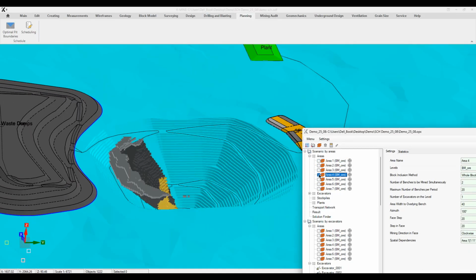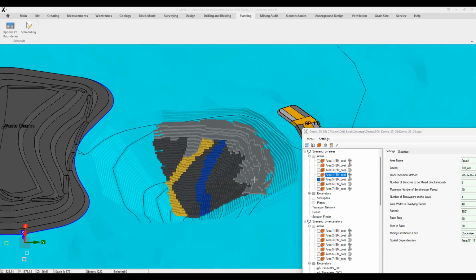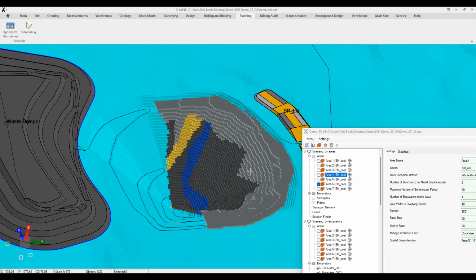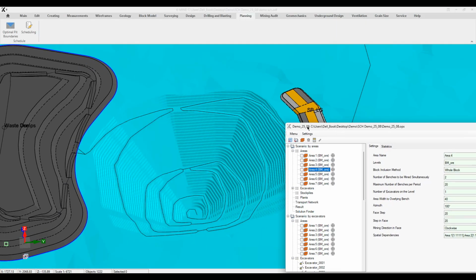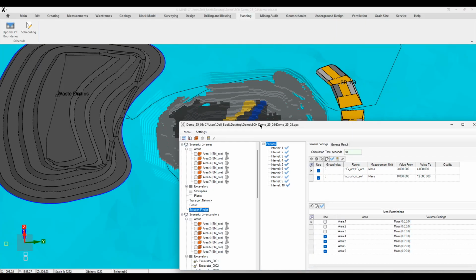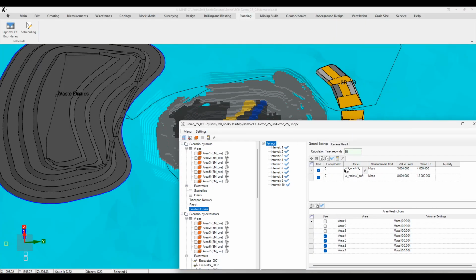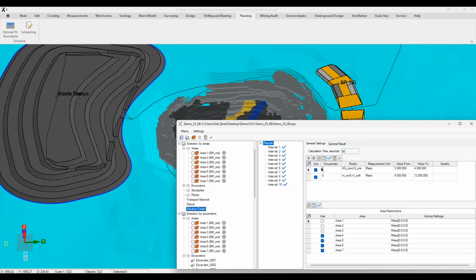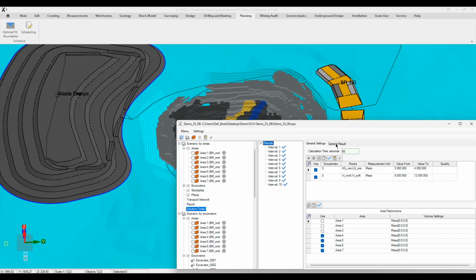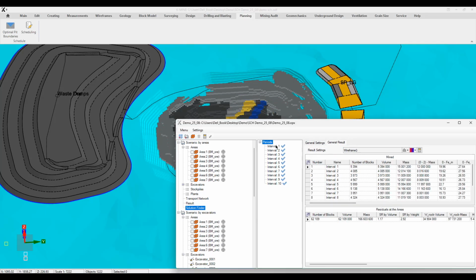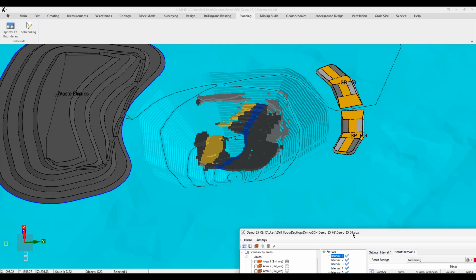To begin, create a project in scheduling. Add a block model, mark the areas, define how you'll mine them, and decide on your tasks and expected outputs. If you're building a long-term or medium-term plan, the automatic solver is ideal. Set your target indicators and let the tool determine when, how much, and what to extract to meet those targets. Targets can be defined by groups, and you can prioritize extraction by manually intervening in the automatic process.